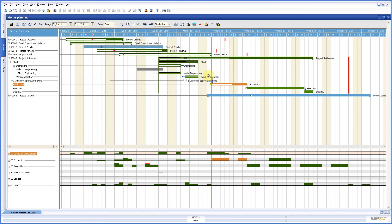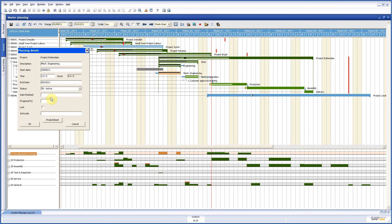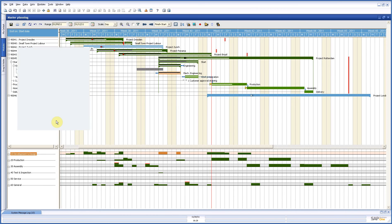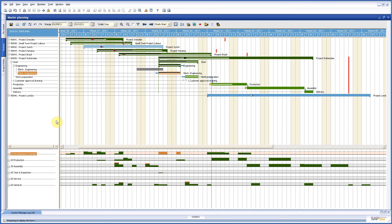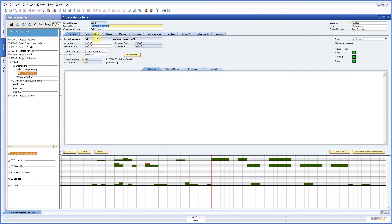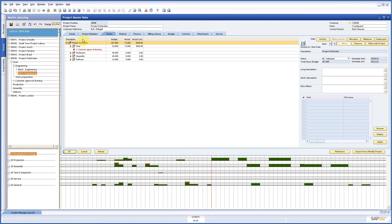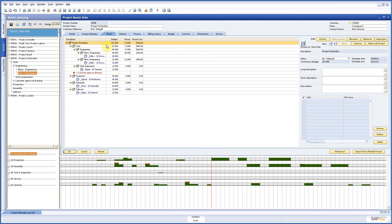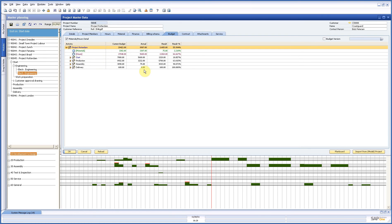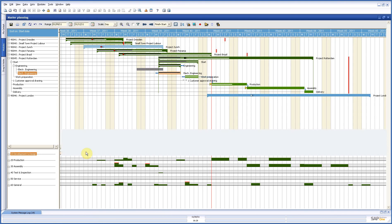Now if you want to see some extra information about what's the meaning of these hour bookings, you can also double click and say I want to go to my project sheet. And here you have the project master data where all the information you have on the project is shown. So if I open my structure, I see exactly where I have to make my hours. I also see the amount of hours booked. And if I go to my budget tab, I can see exactly the consequences of both materials and hours and costs. So every step I make, I have complete control over my projects.